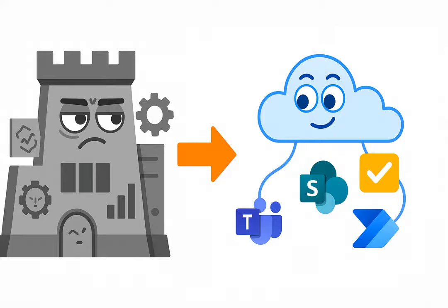Now we add motion, Power Automate. Go to the Automate tab in your list. Choose Create a Flow and start with the template when an item is modified. Give it logic. If the status equals ready for review, then send an approval request to the owner. Add branches for approved or rejected and update the status column accordingly. Optional, post a message in Teams to inform the group. Done. Your list now behaves like a workflow engine. Not bad for 15 clicks.